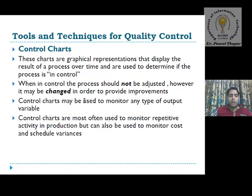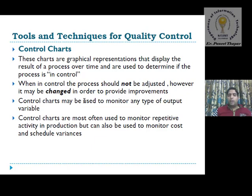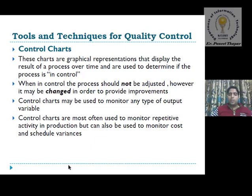The second tool is control charts — graphical representations that display the results of processes over time and are used to determine if the process is controllable or not. We design a control chart and on the basis of this chart we can check quality control. When the process is in control it should not be adjusted, but changes may be made to provide improvement.